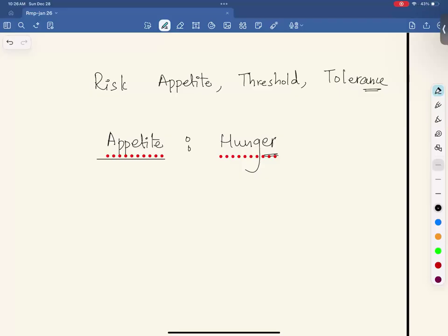So the action owner can be multiple, right? Yes, action owners can be multiple. You have a risk, and let's say one action is about a legal thing, one action is about communication, one action is about ensuring quality. So you can have 3 people who take action for that particular case. But overall accountability is with one person. That is the risk owner. Is it clear?